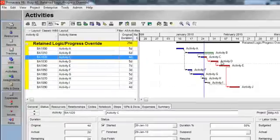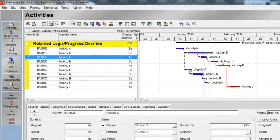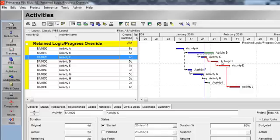So to recap, with retained logic, the remaining duration of a progressed activity is not calculated until its predecessors are complete. With progress override, network logic is ignored and the activity can progress without delay from the data date.